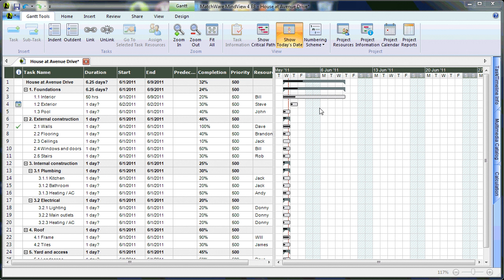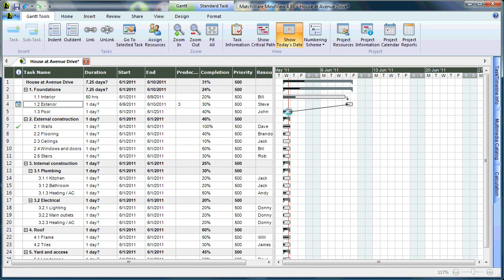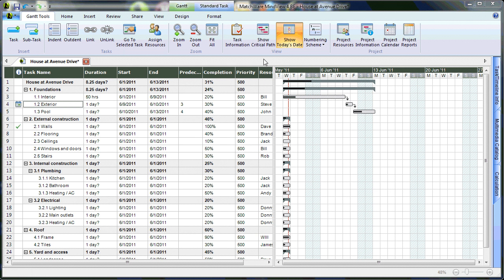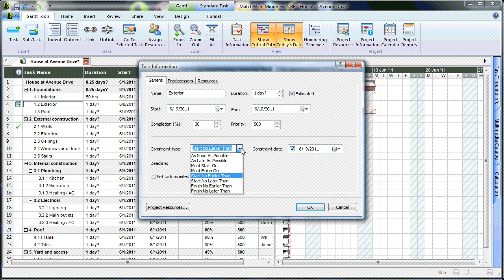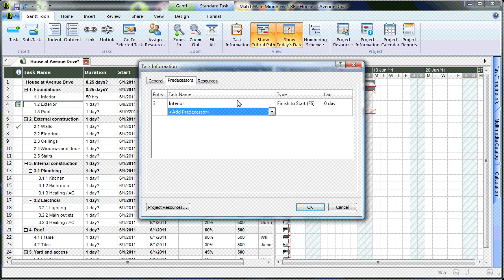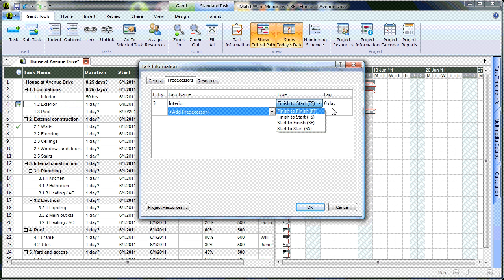You can easily create dependencies by left-clicking and dragging to create predecessor or dependency levels. To show your critical path, simply select Show Critical Path from the View section. For further task information, select the task, choose Task Information, and view all relative information including Estimated Dates, Constraint Types, Milestones, and a Further Predecessor Listing where you can choose predecessor types such as Finish to Finish, Finish to Start, Start to Finish, Start to Start, or account for associated lag time.